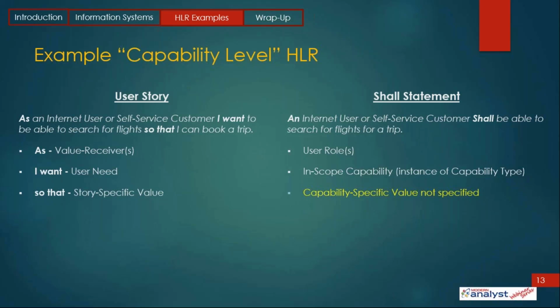Okay, so that's why we don't need it necessarily. Agile needs it normally because they're juggling their product backlog and they want the things of most value, the little bits and pieces they're doing, to bubble up to the top. So that's why in pure Agile, that value is actually very useful. But in Agile waterfall and straight waterfall, not really that helpful.